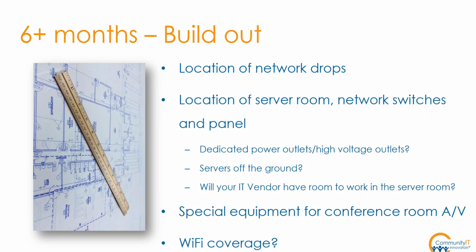So if you're building out your own space, you really want to plan where the network drops are going to go. And so you need to know how many staff you're going to have. Are you going to have 2 people per office? Are you going to have VoIP phones that all require their own networking?